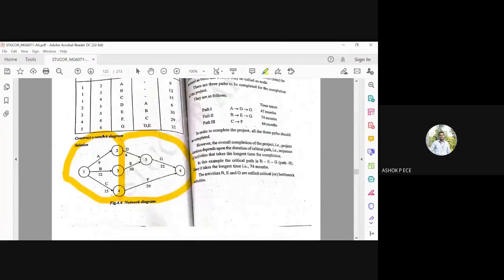So now we have drawn the second portion of the network. The information given in text format, we are converting into the network diagram. From the network diagram, I can apply the usual network analysis theorems for any logic, and I can find all the bottlenecks I'm going to have in my network. So the required network diagram is shown. The circles represent events, as I told you. The arrows represent activities. The arrows indicate the sequence of events to be completed.